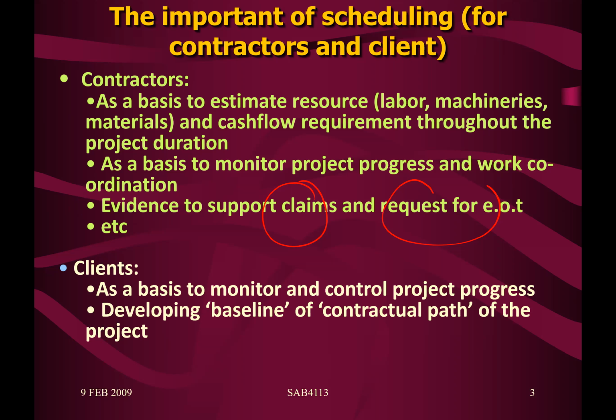If you can show the client your original plan in graphic form, and then superimpose it whenever the delay happens, this is why we are behind schedule due to the factor, that delay could be due to COVID or whatever reason. So you want to show the people, okay?